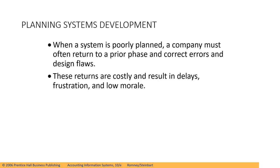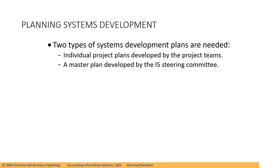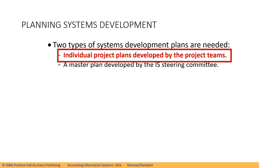When a system is poorly planned, a company must often return to a prior phase and correct errors and design flaws. Those returns are costly and result in delays, frustrations, and low morale. There are two types of system development plans which are needed: individual project plans, which are developed by the project teams, and the master plan, which is developed by the Information Systems Steering Committee. Let's go to the individual project plan.